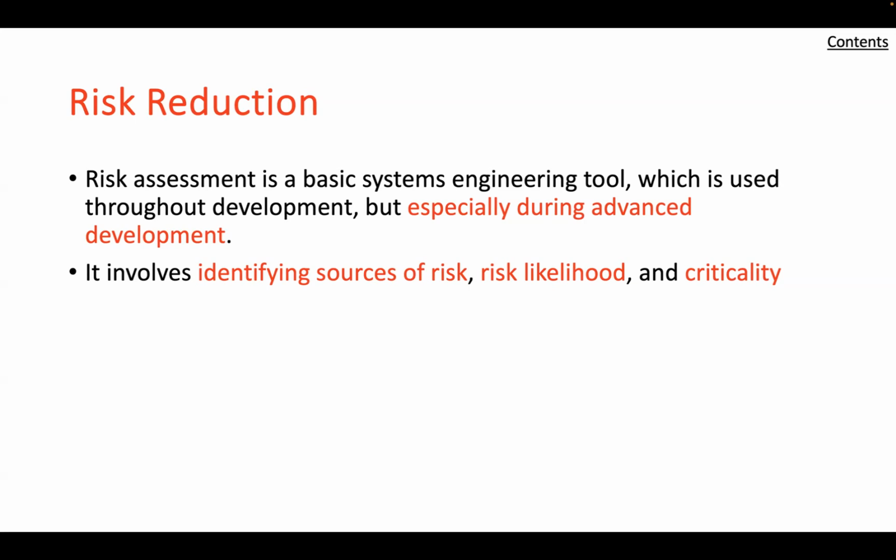The decision as to how much development should be undertaken on a given component should be part of the risk management plan. The objective of the plan is to minimize the total cost of managing each significant risk area. The risk cost is the sum of the cost of such analysis, simulation, and design and testing that may be undertaken. That is the development cost, and the cost of mitigating the residual risk to the low level required to proceed to the engineering design phase. That is the mitigation cost.